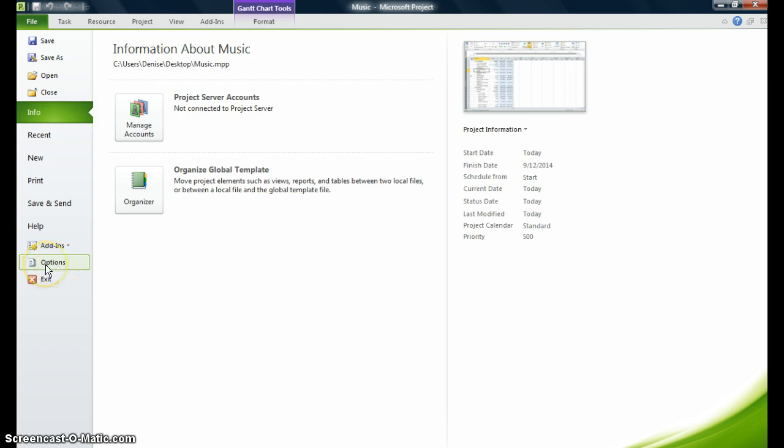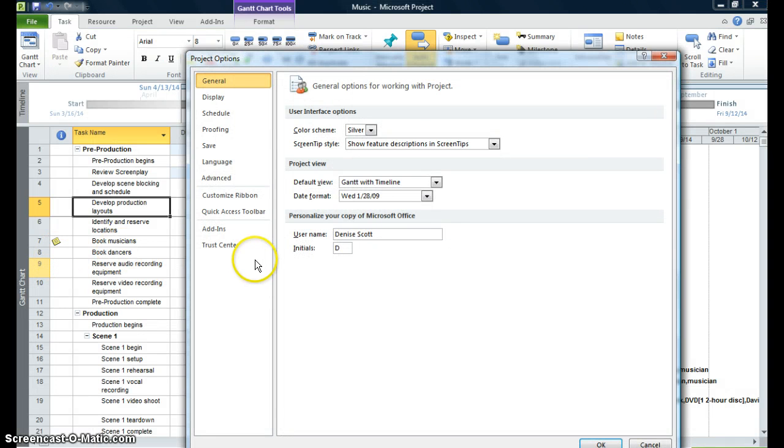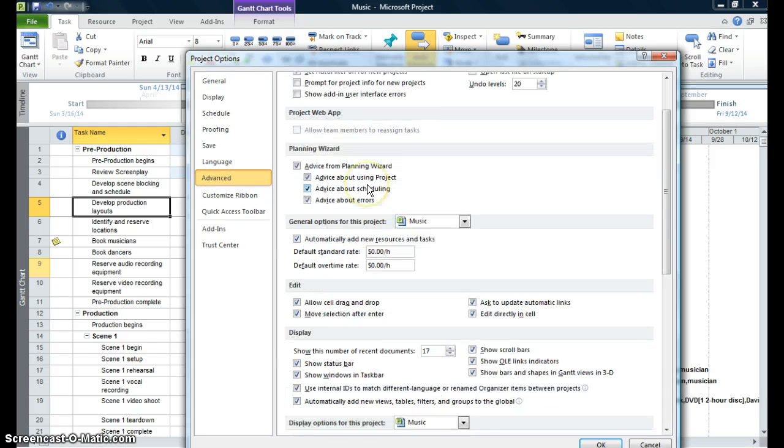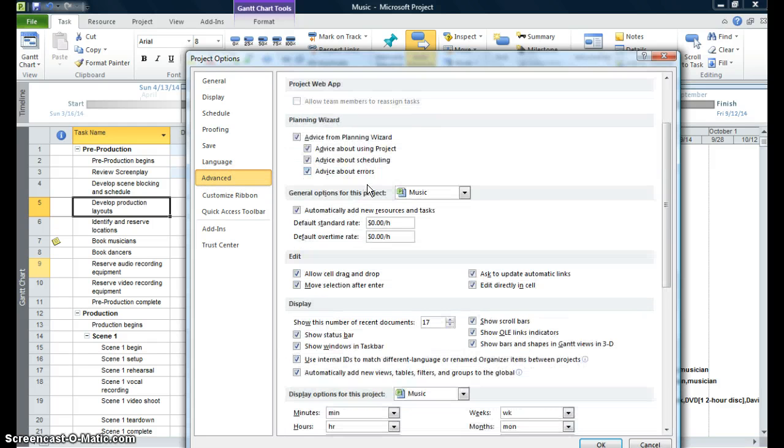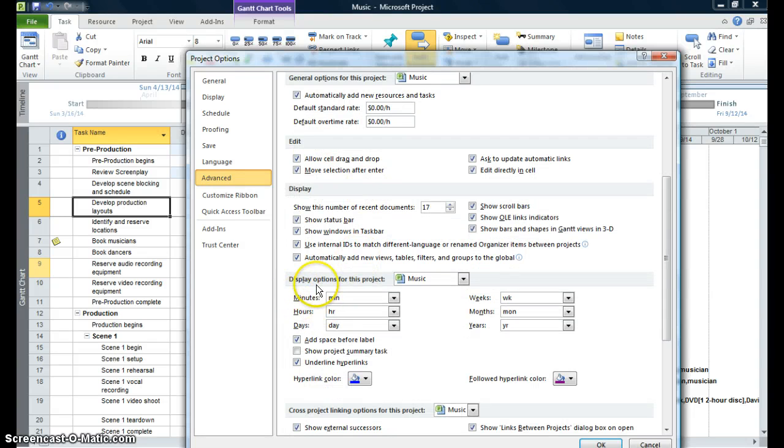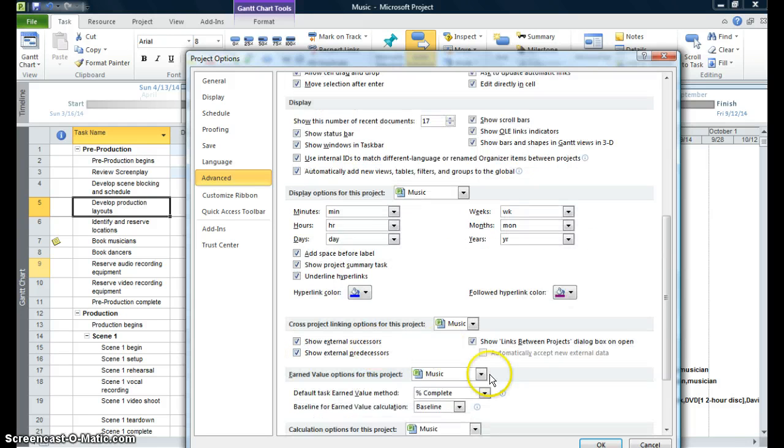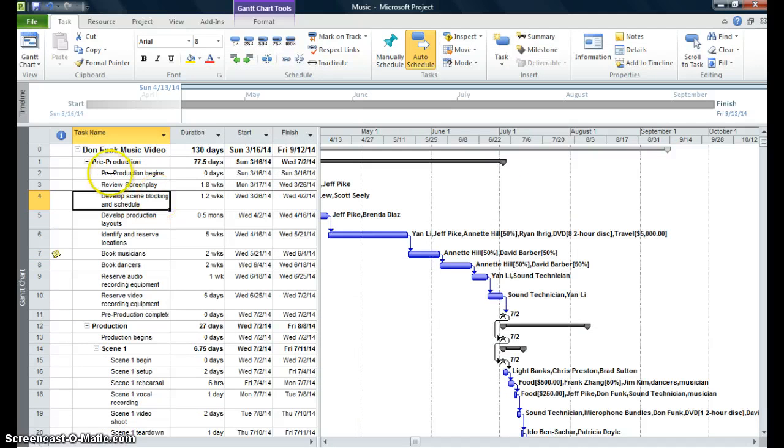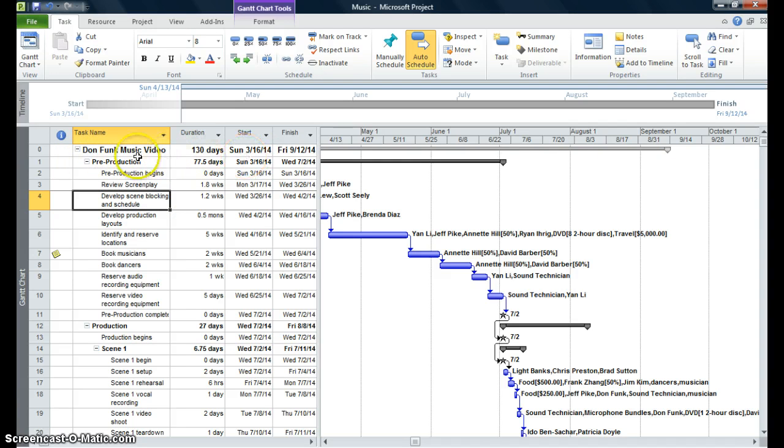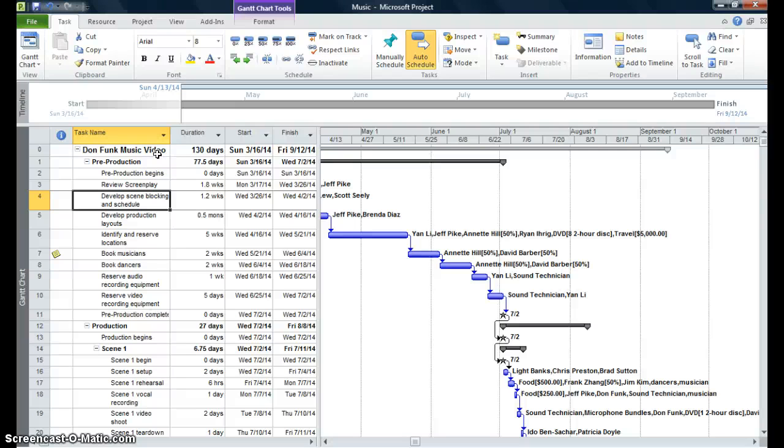Then I'm going to go to my options command. I'm going to go to the advanced command. And I'm looking for, in the display options for this project, I'm looking for this command, show project summary tasks. I'm clicking on this. And I'm going to say OK at the bottom of the screen. And you see that my summary shows up. It tells me how long this project is, 130 days. It tells me when it starts and when it finishes. I can just view it very quickly and find out exactly what it is, the duration, the start, and the finish date.